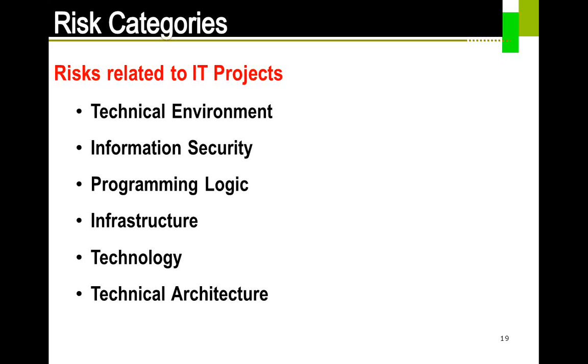Sometimes programming logic might produce some risks. What I mean by that is, say, you're trying to code an array which would occupy, let's say, 999 variables, and then there is a risk that if tomorrow our organization grows to more than that particular value, the program is going to fail.